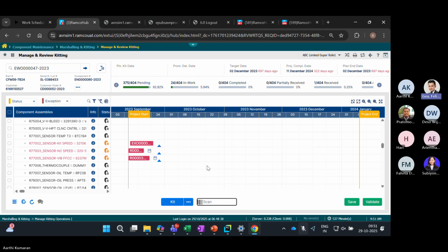In the PO. Or, I remember I told you we also have an MRP module. What that module will do is aggregate all of your forecasts. Let's say you want to do forecasting for the next 6 months. It will segregate based on that and convert it into one PO. And then one PO of 5 lines will break into 5 different demands for 5 different ESNs as well. The engine removal forecast comes from Garuda Airlines, which is what will then be converted into a demand document to do an overhaul or whatever work scope needs to be done. So demand is always projected by project, and aggregation happens at the PO level.